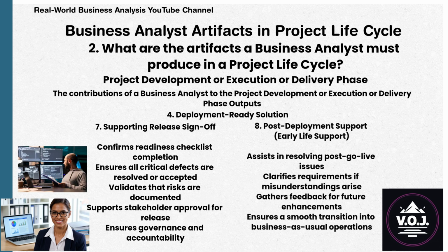7. Supporting release sign-off. The BA confirms readiness checklist completion. Ensures all critical defects are resolved or accepted. Validates that risks are documented. Supports stakeholder approval for release. And ensures governance and accountability.